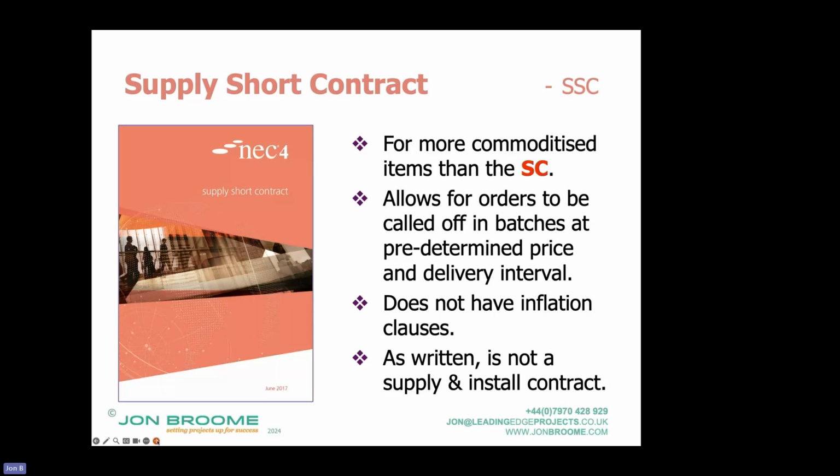It doesn't have inflation clauses as written. And again, as written, it's not a supply and install contract, so you'd need to modify it. Again, outside the UK, and possibly even in the UK, if it's not considered a construction operation, it's not a big thing, but it just needs to be done. Okay.